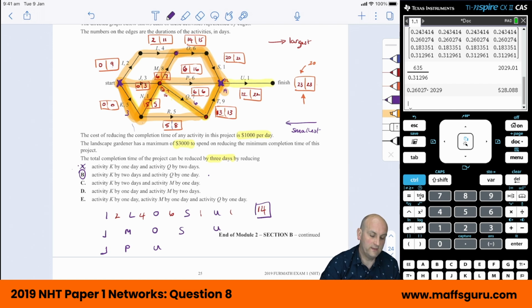Okay, and one of these obviously would come out with 23, the K, N, Q, T, and U. Yeah. So having done that, then what he will do is go back through all of these and reduce all of them to try and find out whether a new critical path would be gained and which one would then change. All right, it's time consuming, but to be perfectly honest with you, it might be slightly less than forward scanning and backward scanning and all those types of things. But again, remember that these questions here are really making you work for that 1 mark.